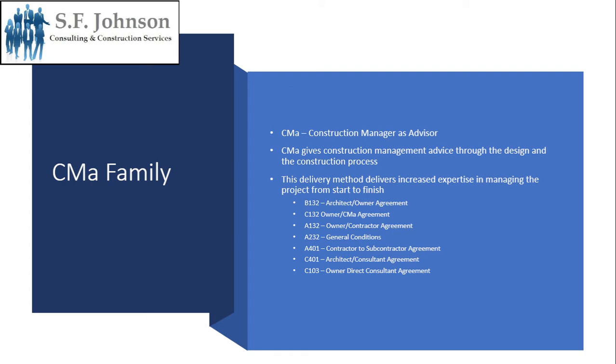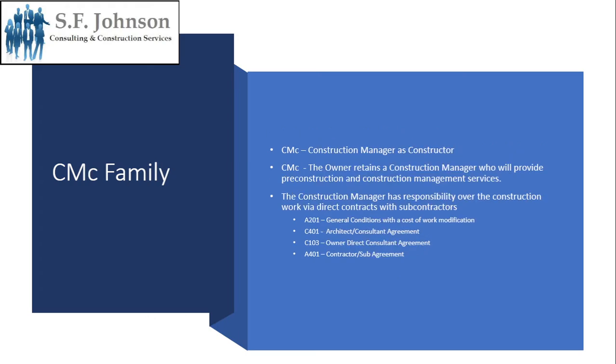The next set is CMC, where the construction manager is also the constructor, or the contractor. So CMC, owner retains the construction manager who will provide pre-construction and construction management services. The construction manager has a responsibility over the construction work via direct contracts with subcontractors, so that's important.